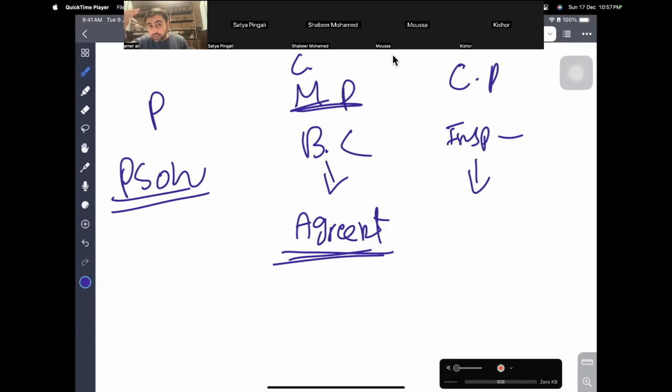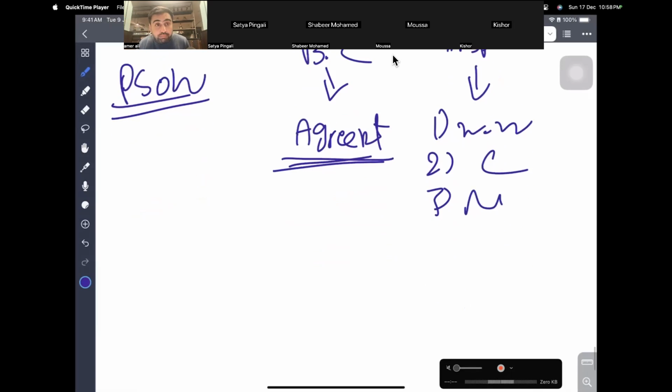The conflict has 4 parts. First, we try to get a win-win situation. If we can get it, good. If not, do what is written in the contract. If not, get a mediator or a third party. And then if not, go to court. That is how the procurement should flow. Procurements are closed throughout the project.